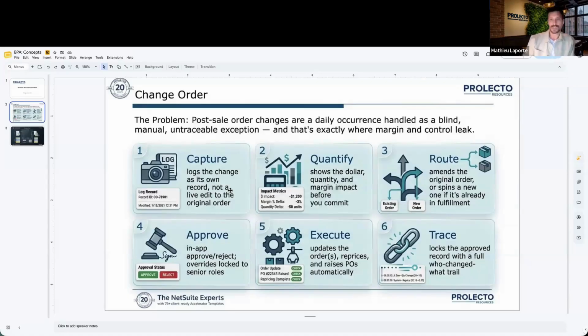Capture all the changes, but also quantify. Another use case could be that you send a customer maybe three versions of a change. You can do it in minutes, right? Here are three options, which one do you prefer? Oh, I prefer that one. Okay, then you approve one, and the other two are rejected. That's one use case.